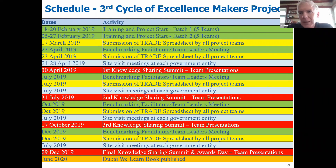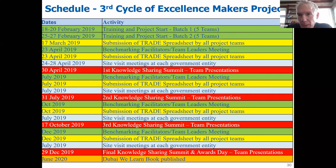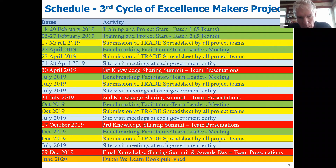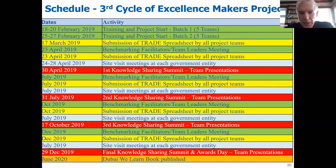This is the schedule: training at the start, and all teams need to submit TRADE spreadsheets as they pursue the project — this is a project management system that lets us monitor progress in real time. We have regular site visit meetings with each government entity, two hours each, to understand the problem in more depth and provide benchmarking advice. Every two to three months we hold knowledge sharing summits where all teams come together, share progress, learn from each other, and many become benchmarking partners. At year end, we have a final summit and awards day with international judges assessing the projects.